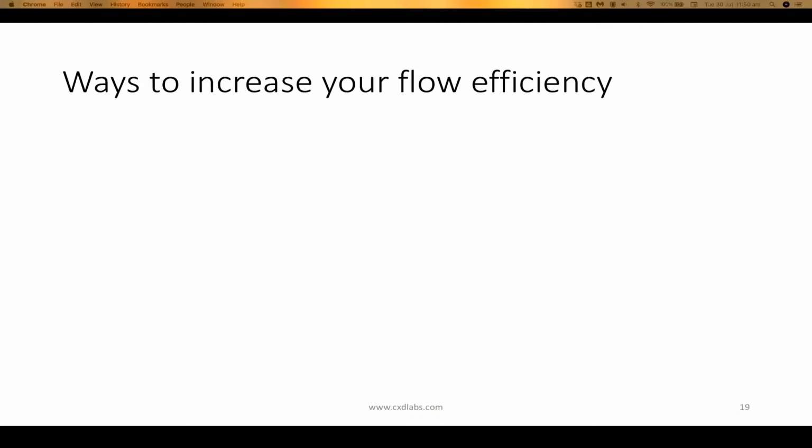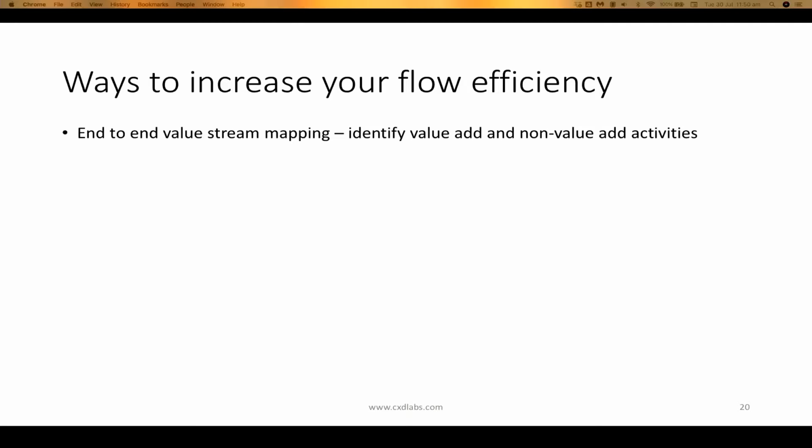So what are some ways to increase your flow efficiency? A really good technique to use is value stream mapping, end-to-end value. I specifically put end-to-end. So looking at from when the customer first sees or tries your product to when you start using it and you start managing it and you bill them for it. That end-to-end value stream. Typically, it's for a specific product or service, and you want to map from end to end all your value-add activities and non-value-add activities.